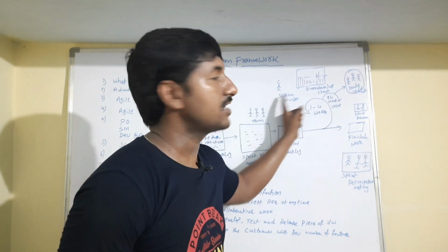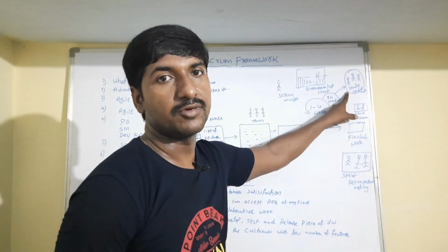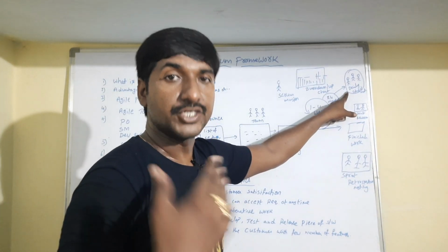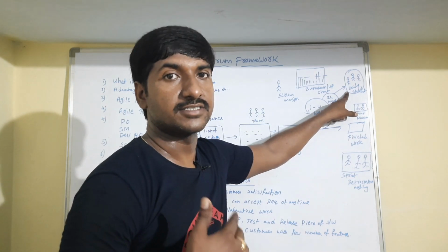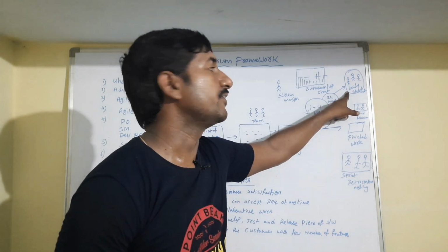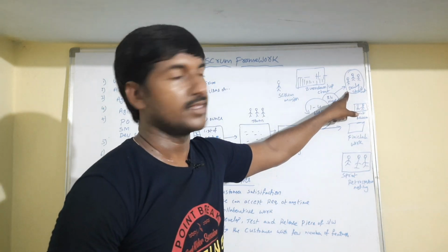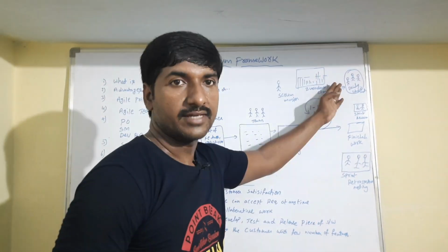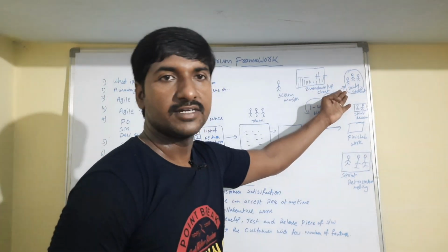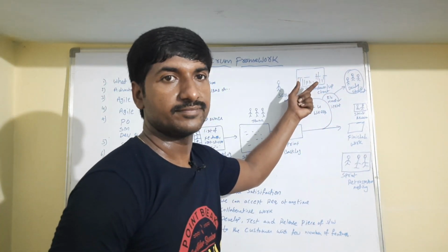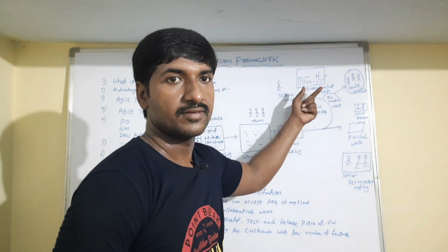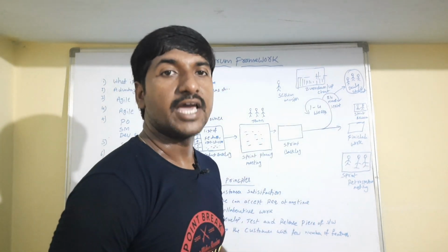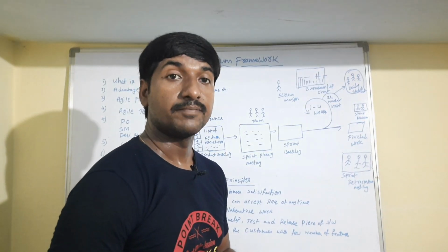The Scrum Master will ask each individual person what you did yesterday, what you are doing today, and what issues there are. He will discuss each and everything in 15 minutes in the daily stand-up meeting. Also the Scrum Master will prepare one burn down and burn up chart in the form of a graph based on their feedback. Based on this chart, we can analyze the performance of the product.